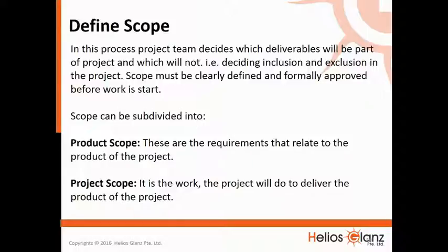Scope can be subdivided into product scope, which are the requirements that relate to the product of the project, and project scope, which is the work the project will do to deliver the product of the project.